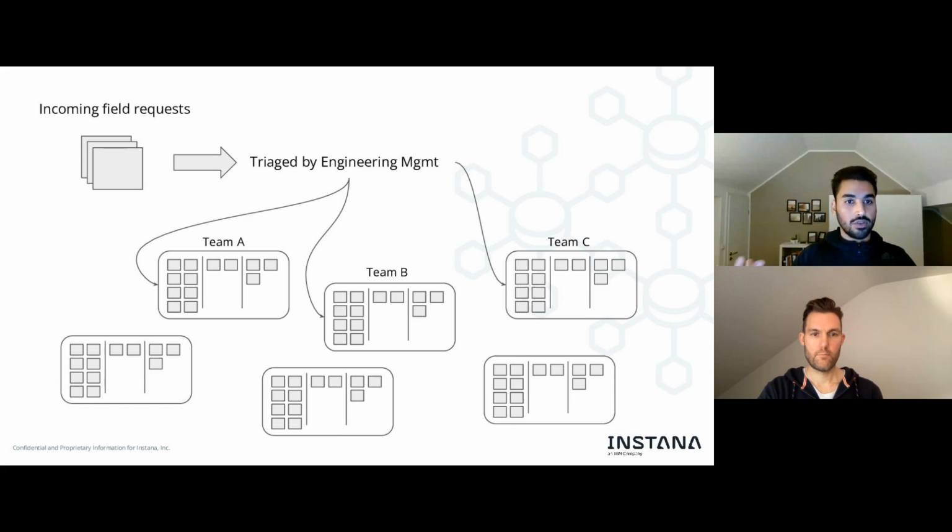And for the team, it's now just a pull mechanism, right? Whenever you have time, you can pull that bug and see, all right, the work in progress limit allows me to work on this. Let's just do it. And you could even go a step further and introduce algorithms that automatically prioritize those bugs, right? I think the more mature you are, the less you think about what you want to pull next, because once you have this algorithm of prioritization, you can always just pull the topmost card and say, well, this is the one with the highest priority. My work in progress limit allows it. Let me just pull this.